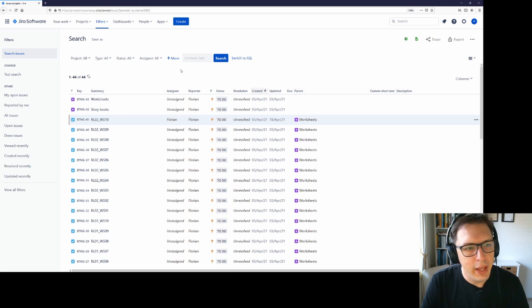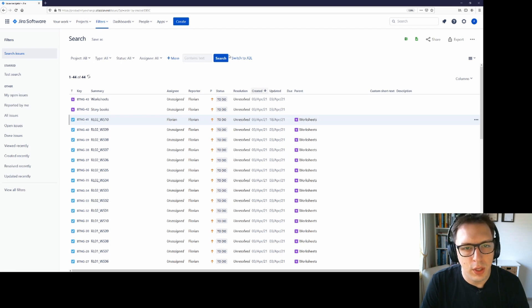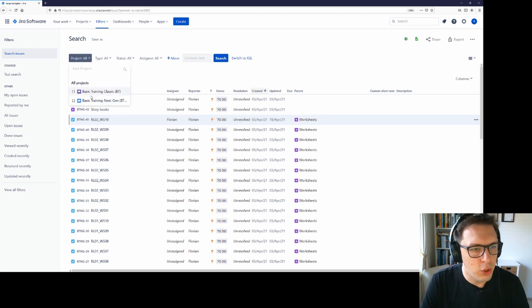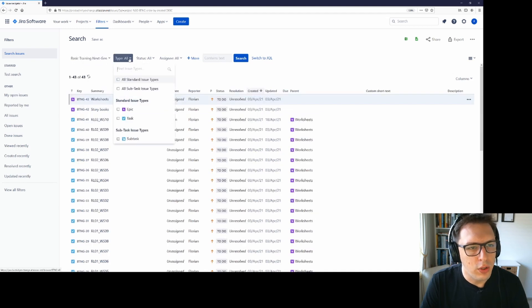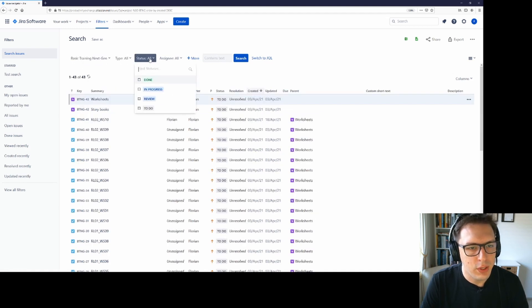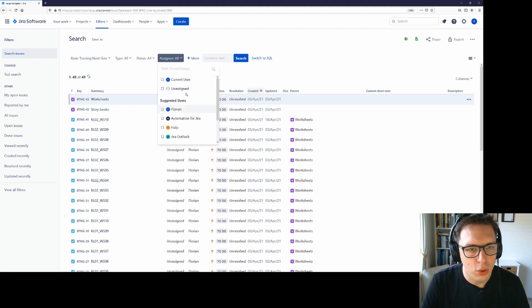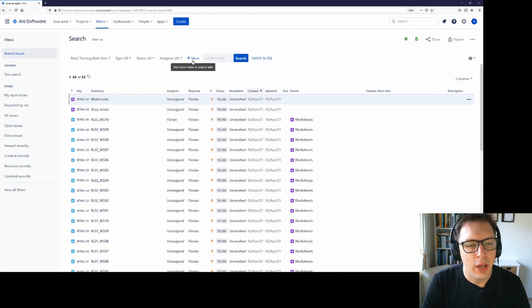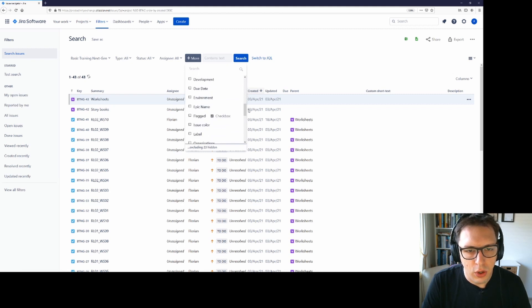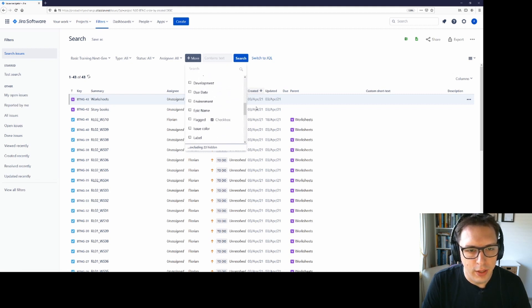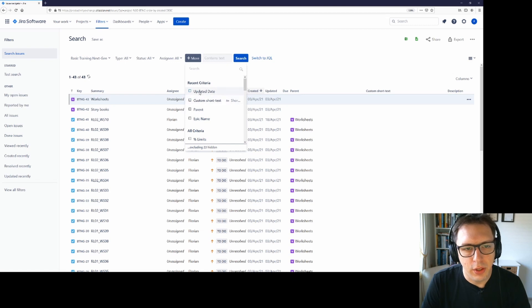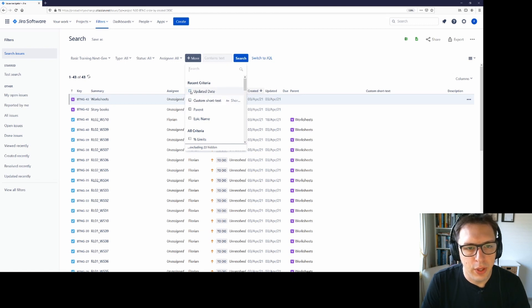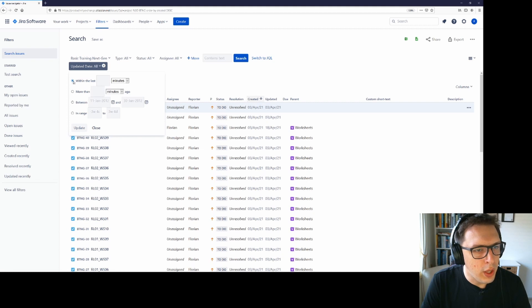Now that we've done that, let's do our first search. By default, you will see this view here. You can select what project you want to see. You can also select what issue type you would like, what status the item should be in and who the assignees should be. You also have the option of more and you can find any field on any of the issues and then filter by them.